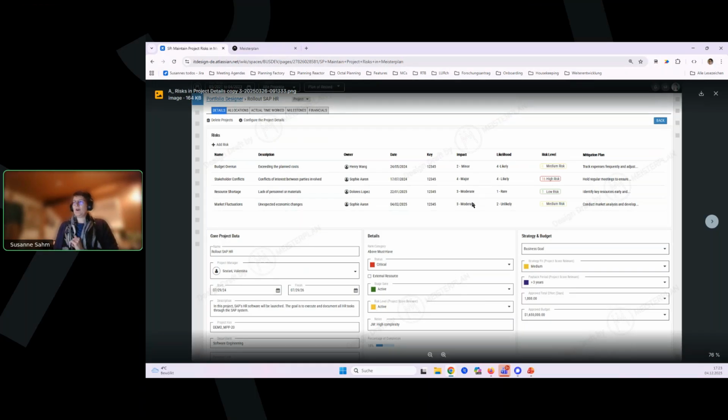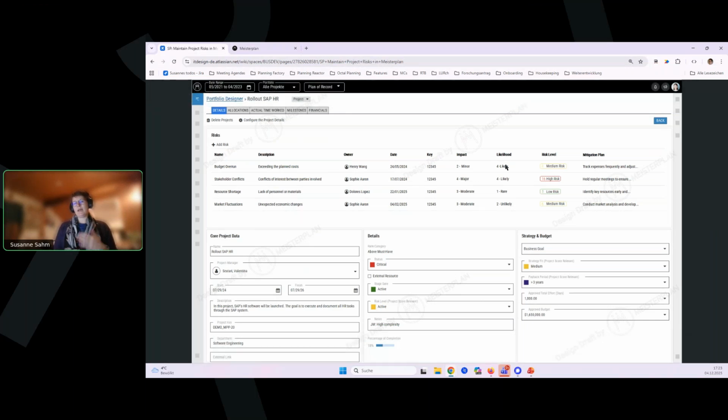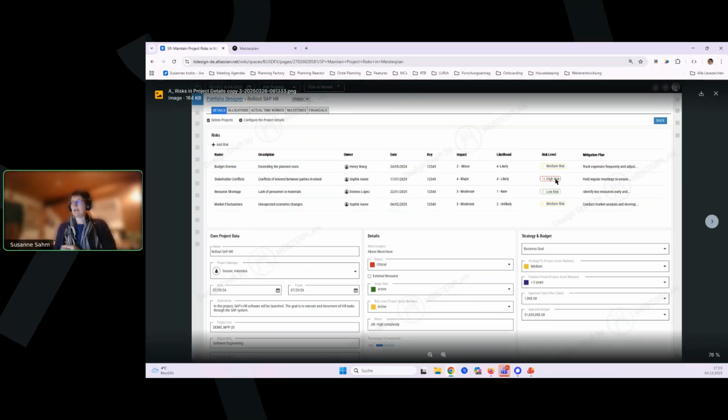And then we offer a calculation between impact and likelihood. All risk frameworks that we looked at had these 2 dimensions. Sometimes they have different names, like severity, for example, or probability of occurrence. But they all do the same thing. They multiply 2 numbers and give the result a label.